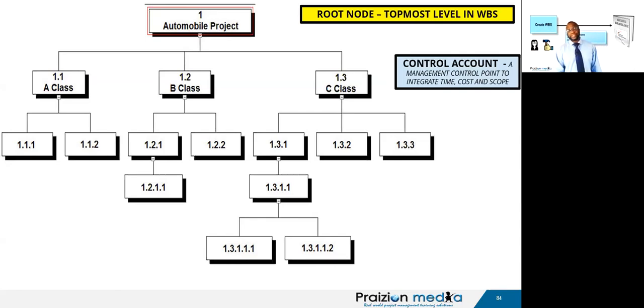But some projects, such as those I've managed, got control accounts coming out of the woodwork. Control accounts with a CAM on top of it. What do I mean by CAM? This is not PMBOK guide stuff, but in the world of government, we would call them control account managers. Can you imagine that? So you've got a project manager, then you've got control accounts and control account managers managing each piece or each silo of that project.